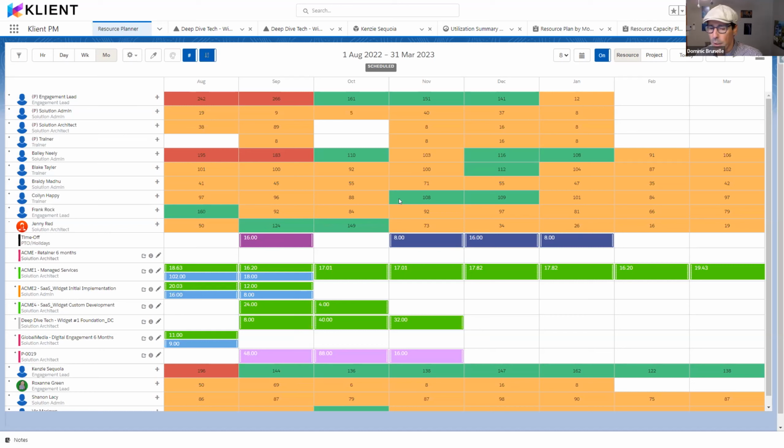Do you move the projects? Do you swap that resource for just that period? Do you crash the project and add more resource to take the load? So there's different options here. But as far as vacation, the system is not taking decisions for you, because there's several use cases that you might want.